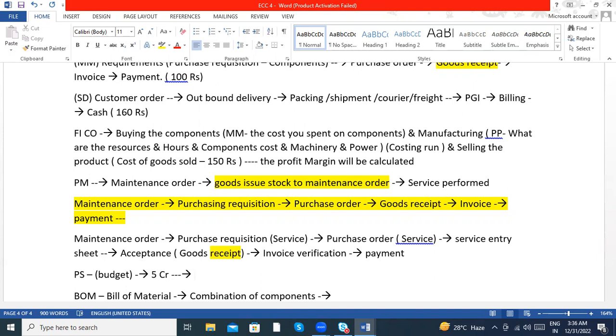So what they will calculate first is what is required to construct this, what activities are required. All these related activities will be listed out, and they will be allotted some budget. Out of the 5 crores budget, some amount is allotted to this kind of work, and some to that kind of work. That we generally call a WBS, work breakdown system.